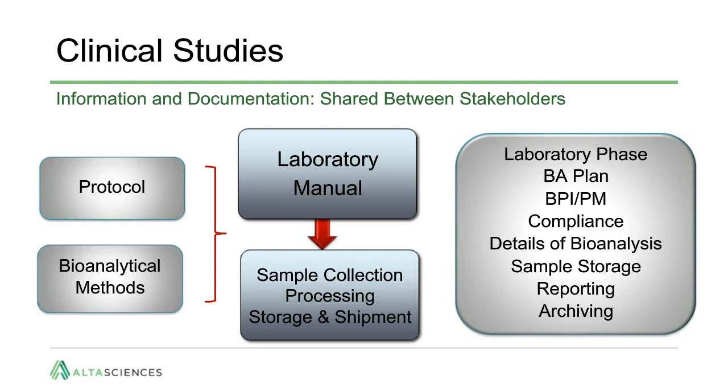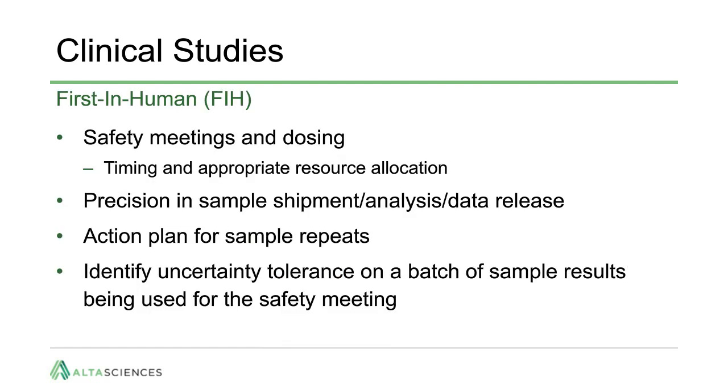For successful project progression, the document should be shared for review between the different stakeholders prior to finalization and at the appropriate time. For first-in-human studies, the bioanalytical sample schedule is based on the dosing and safety meetings and requires some discussion. There needs to be precision on sample transfer, shipment, and sample analysis, the resource allocation such as staff and instruments, and provisions for data release.